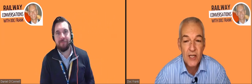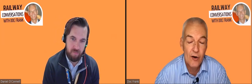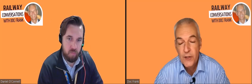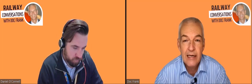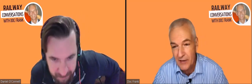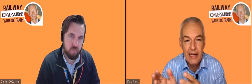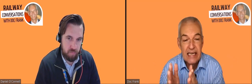Yeah, because you're not just sitting at the end of the signaling delivery. The signaling itself very often sits at the end of the entire project delivery. So any delay in building the railway corridor falls back on the signaling system, and any delay in the signaling system falls back on testing and commissioning. Any delays in digging the tunnel falls back on building the rail corridor, which falls back on signaling, which falls back on testing and commissioning. So you, in your position and in your discipline of work, are always at the receiving end. You're always sitting at the very, very back end, and any time delay will basically eat into your time.